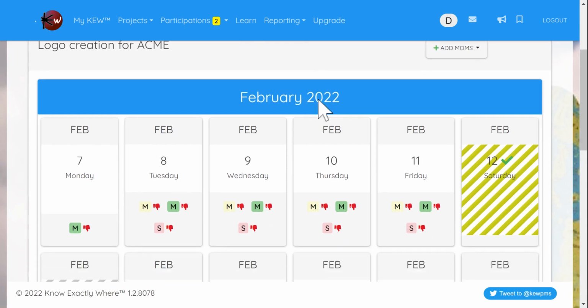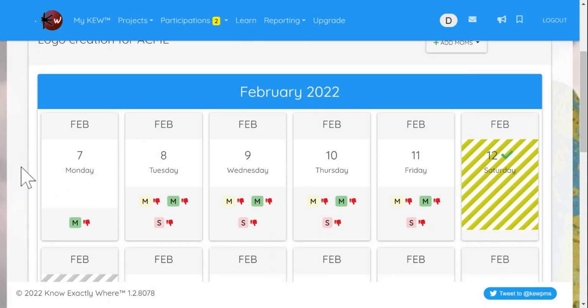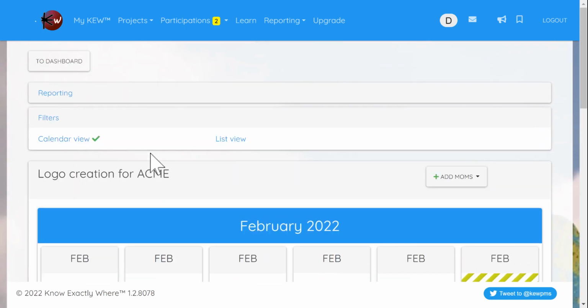In this case, because we have recreated the dates 1 week earlier and none of the tasks are completed or even in progress, we see that the first week has all become a thumbs down. So before we had a pretty nice project plan, or a pretty nice calendar. Right now it's terrible because we're late on most things, and that's obviously because we created the project to have started a week earlier. Therefore, all those first week tasks have not been performed, so they're showing with a bad task health. Actually, if I go to the list view, you're going to see this more clearly.